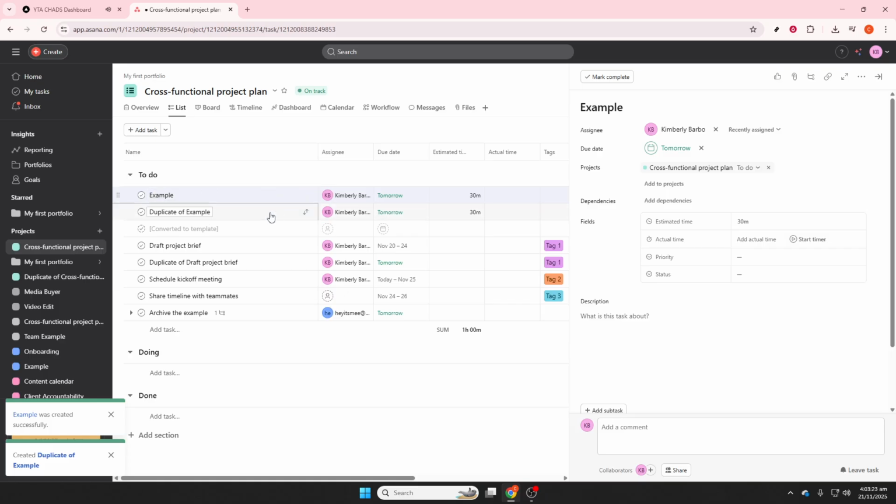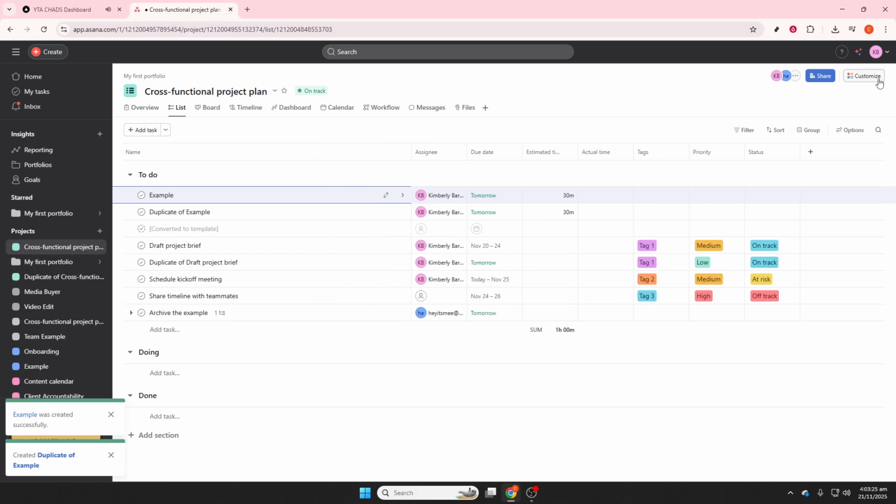To recap, build one thoughtful master task with subtasks, an assignee, a due date, and custom fields. Open More Actions, select Duplicate Task, choose to copy subtasks, description, attachments, and custom fields, then click Duplicate and personalize each copy. Use this approach whenever you want speed and consistency across your content pipeline. Give it a try and watch your production scale without sacrificing quality.